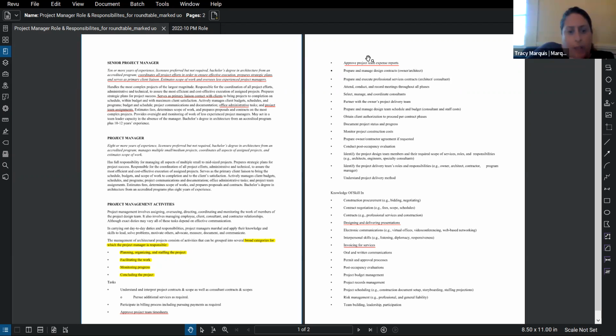Hi, this is Tracy Markey. I practice as both an architect and an OPM. In my past experience, both the OPM and the architect have reviewed payment applications. So it's sort of like a double check, but the architect still has to sign off on it. That's because of the contractual requirements to certify the project at the end, I believe. Could be wrong. I don't know if anybody else can talk about that. Yeah, that makes sense to me.